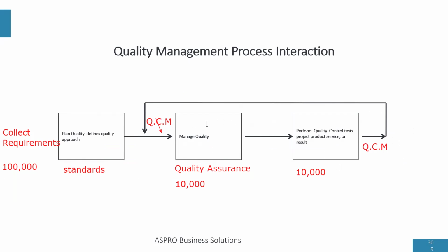And that means that quality assurance, right? When you do quality assurance, it leads us to quality control, which means if quality assurance is done well, we won't have quality control issues. But in the same way, when we get the results of quality control tests, which is when we test the final product, quality control measurements serve as a feedback for us to adjust our processes to improve the product.